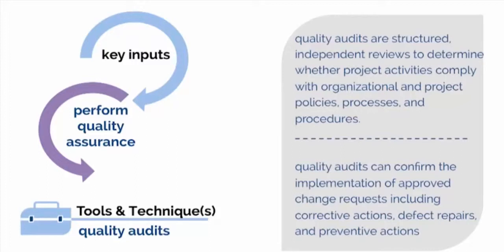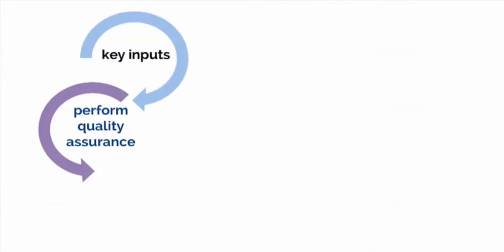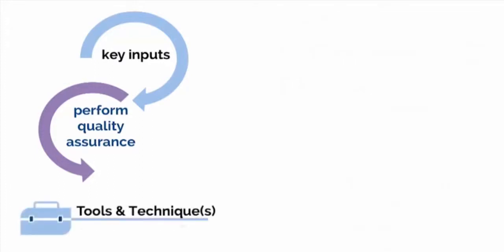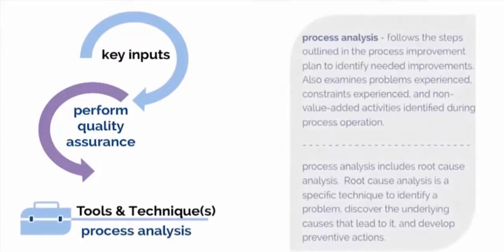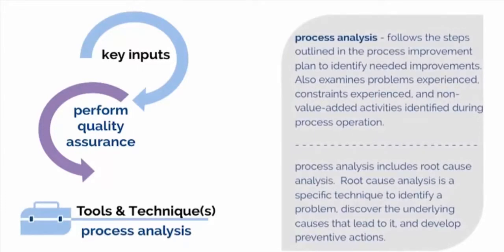One thing that I always mention to professionals that helps them remember the purpose of any type of audit in PMBOK methodology is this: audits are always a review of processes and not a review of deliverables. Once I say that, the definition of a quality audit makes more sense. So, in quality assurance, we do quality audits. Another tool and technique of value is process analysis, which follows the steps outlined in the process improvement plan to identify needed improvements. Process analysis also examines problems and constraints experienced and non-value-added activities identified during process operation.